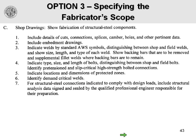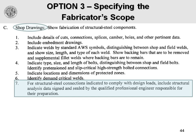Here's another example regarding shop drawings. Those familiar with Option 3 know that fabricators provide design calculations but also shop drawings — two distinct different things. Here's an example where Note 7 reads: for structural steel connections indicated to comply with design loads, include structural analysis data signed and sealed by the qualified professional engineer. At this particular job, this was not interpreted as shop drawings having to be signed and sealed — it was interpreted as the calculations needing to be signed and sealed. It turned out the engineer actually wanted the shop drawings signed and sealed. I would consider this not to be an effective way of communicating that desire.